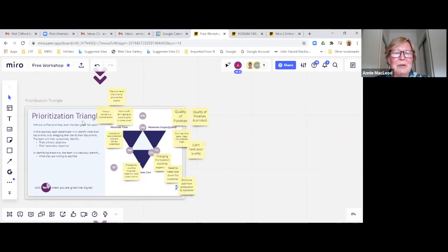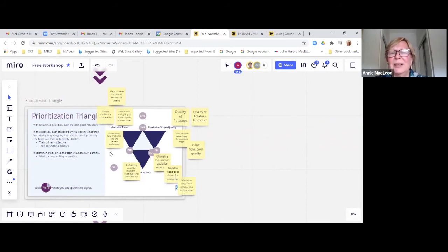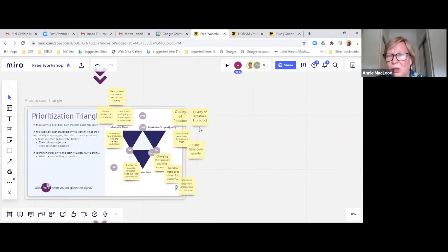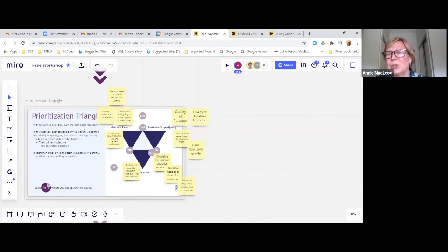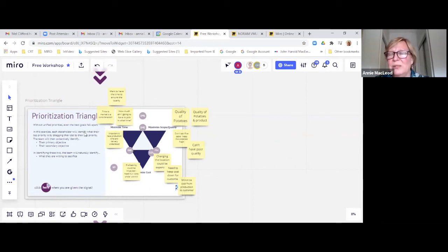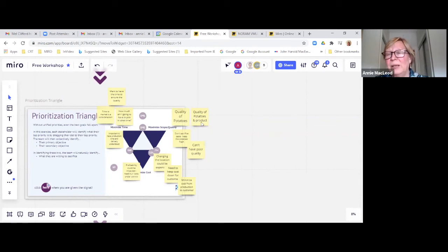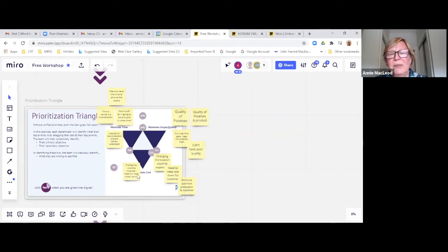If you're actually executing a project, then it's time to go back to these priorities and see if that change request has any material effect on those priorities. Because usually what ends up happening is you have a whole bunch of C-suites that are pushing on time. Get this project done and I want to get to market and you've got the frontline people that are trying to push quality and trying to do a good job and those things will end up being in a natural conflict. But at least this is a tool and a technique that now gives you the negotiating power to sit down with those C-suites and say, fine, here's where we're at with all of these things. But if we want to keep the quality of the product up and we still need your time to market, then here's what's going to cost us.